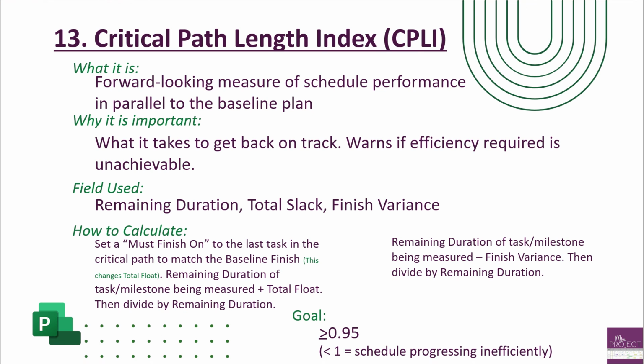So the missed task tells you if you're falling behind, and the CPLI tells you what it takes to get back on track. And there's 2 methods to calculate this, using your remaining duration for your total project and your finish variance or your total slack.